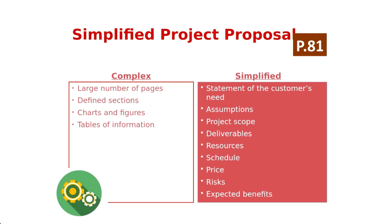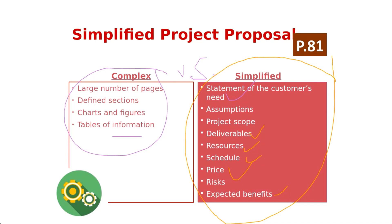On page 81 you will see a simplified project proposal. There are two types of project proposals: the more common full proposal — often hundreds of pages with charts, figures, tables, and many sections, generally for massive engineering projects — and a simplified project proposal, which includes the customer statement of need, assumptions, deliverables, resources required, schedule, price, risks, and expected benefits. This simplified format is also the format required in your assignment, so when you approach your assignment this is the structure your lecturers will be looking for.